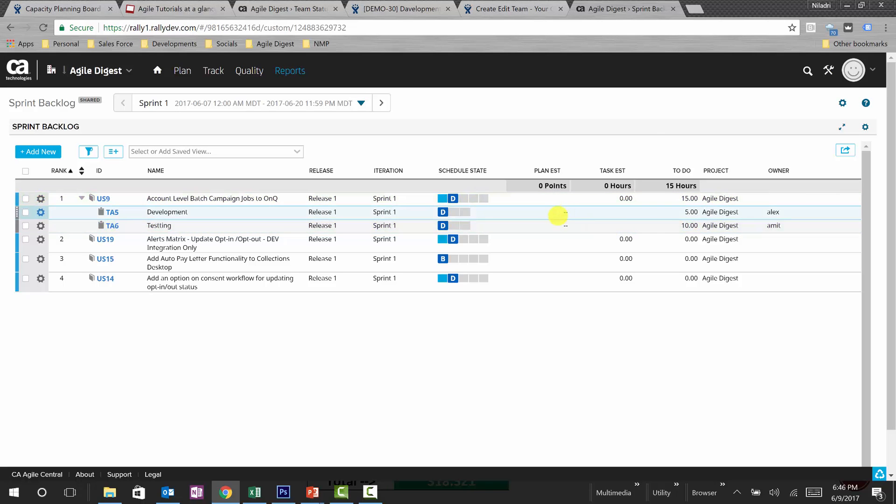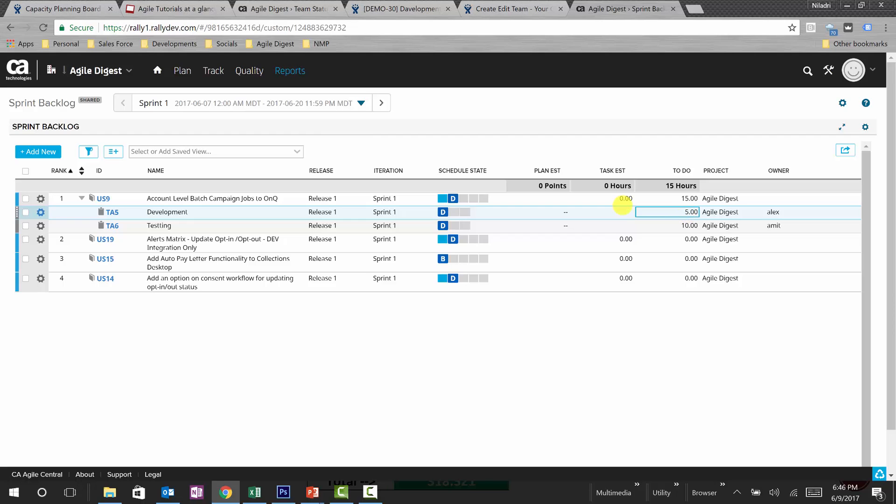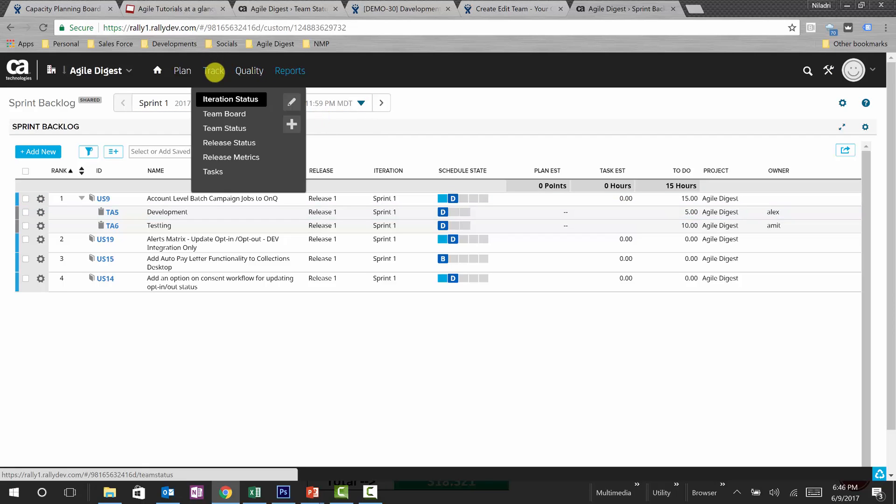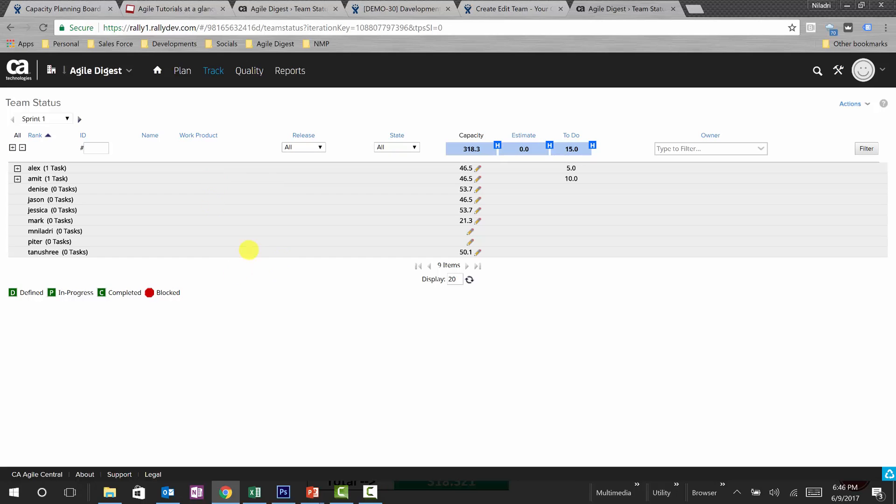So there are two tasks. I am not concentrating on plan estimate or task estimate. I am just looking into to-do. This is in Rally the remaining hours as of now, so every day you need to change this value based upon your to-do. Now if I again go back and look into the team status, it says five here is a to-do and this is already allocated out of 46.50.